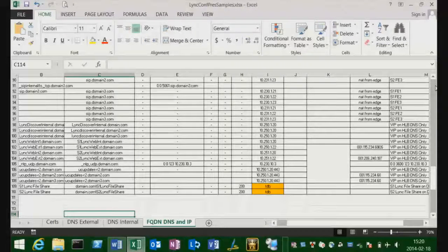They just put a full pool in place with a full double edge, and they have another pool in another office. So it's got 3 SQLs. This one's got 3 SQLs. There's 3 edge pool. There's all these servers and components. And this is the level of planning that I think is required before we start pushing buttons on building servers. And I've been involved in a lot of projects where they didn't do this, and we're back in there later doing this chart for them so we can figure out what the heck is going wrong. Why aren't we getting traffic from spot A to spot B?